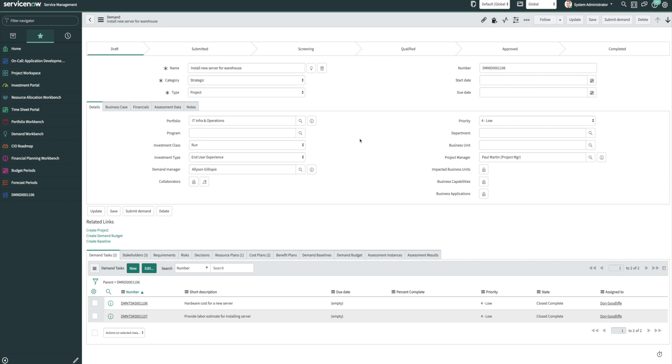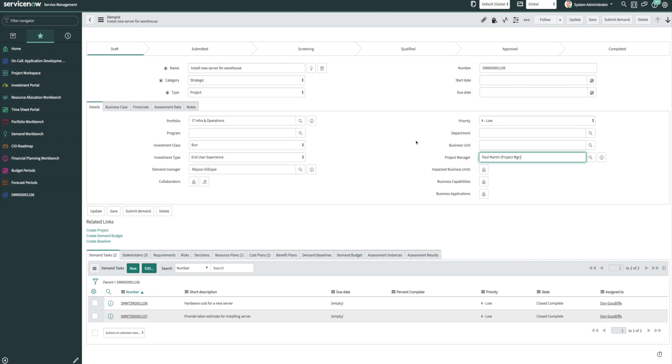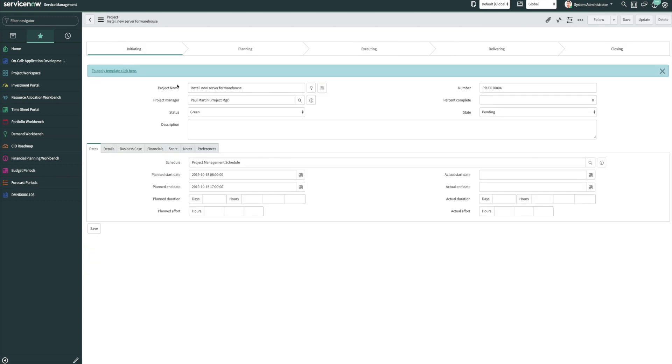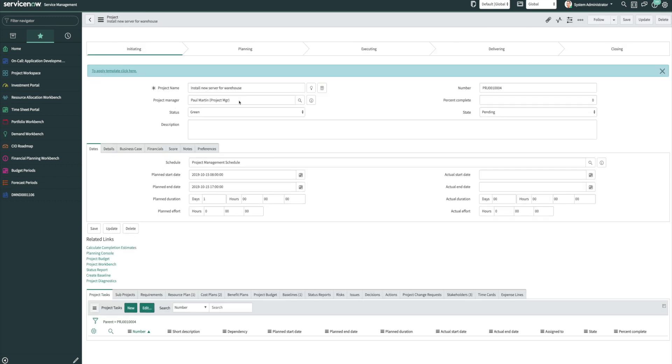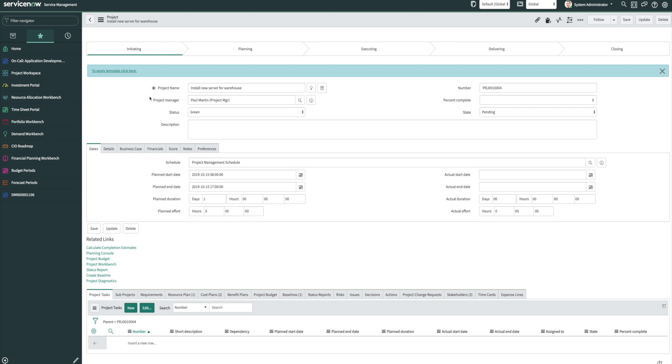The other small little feature that ServiceNow added in here was adding the project manager field to the actual demands. So before you never had visibility to go ahead and plan out your project manager as you're planning out your demand and reviewing the financial pieces of it and kind of gearing up for your project. So now they've brought over the project manager field onto the demand. So if we are to promote this demand to a project, we can jump over here and see now that the project was generated and it already has that project manager assigned. So it copied directly over.